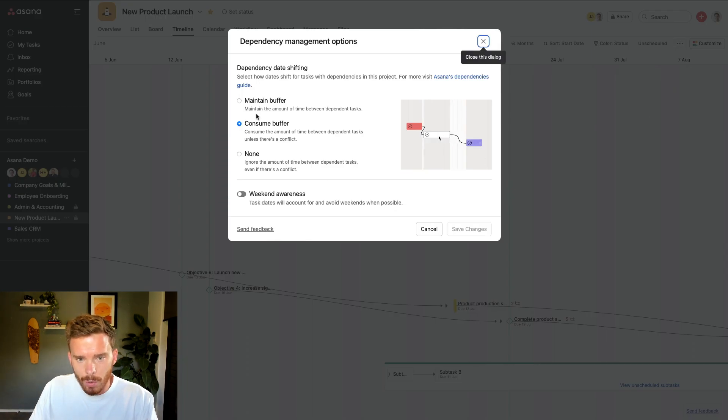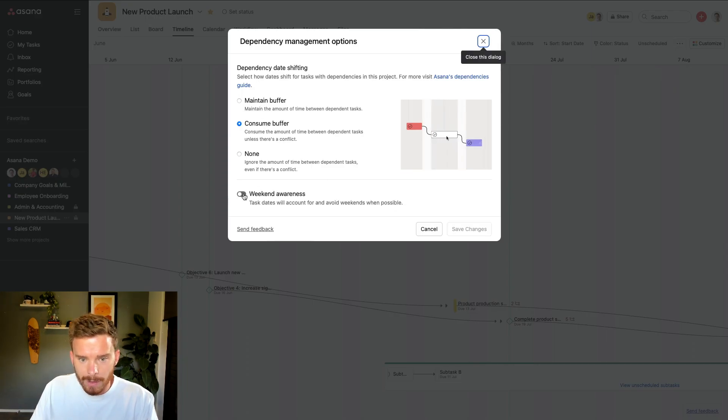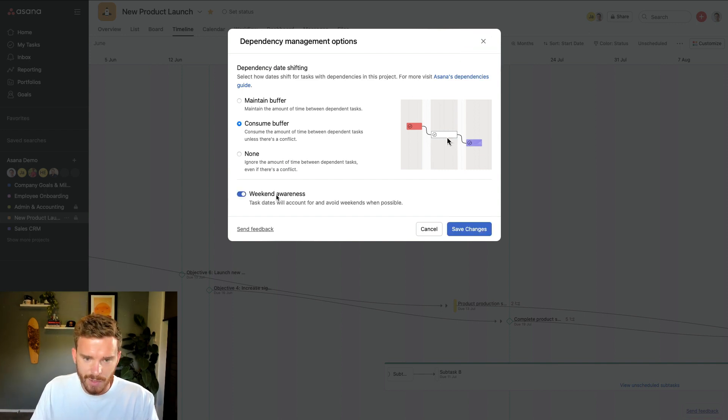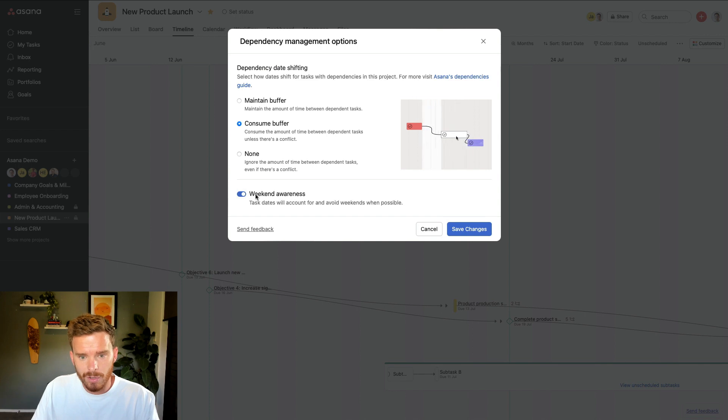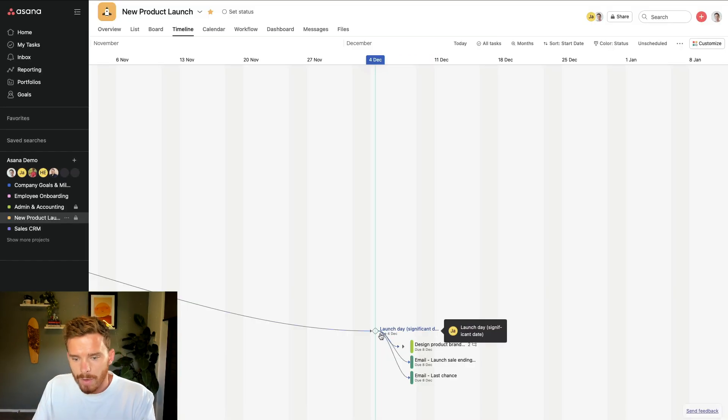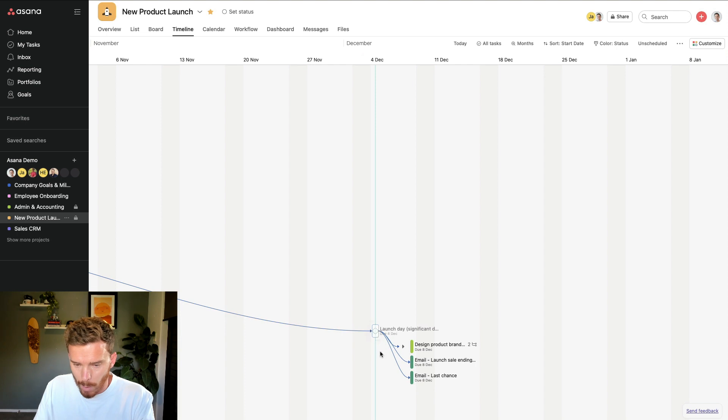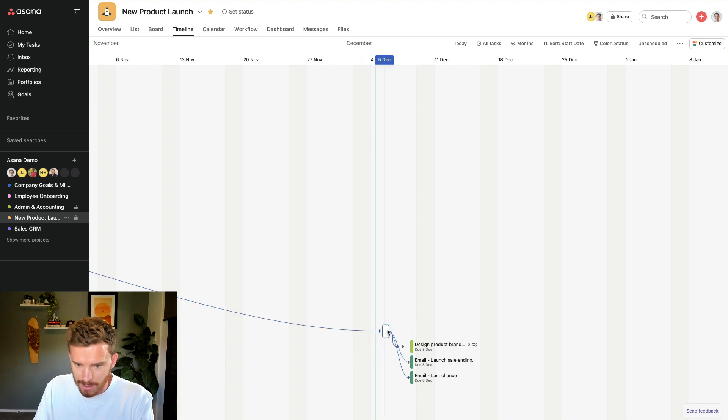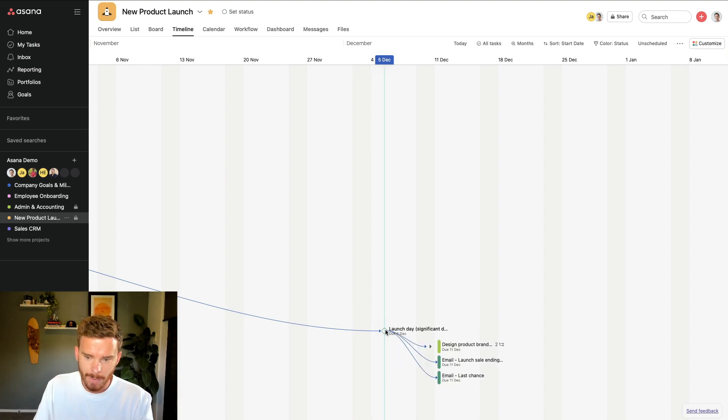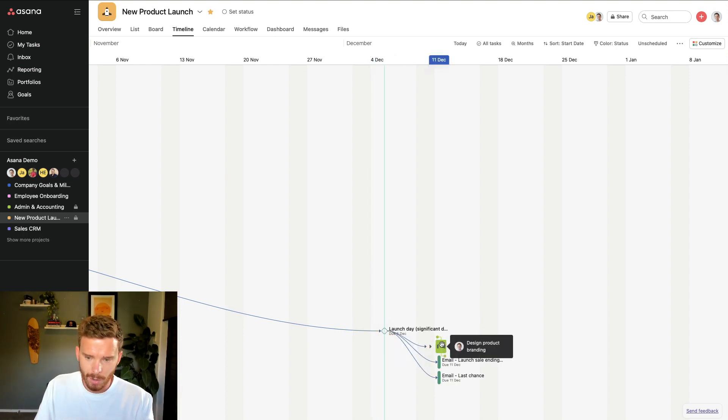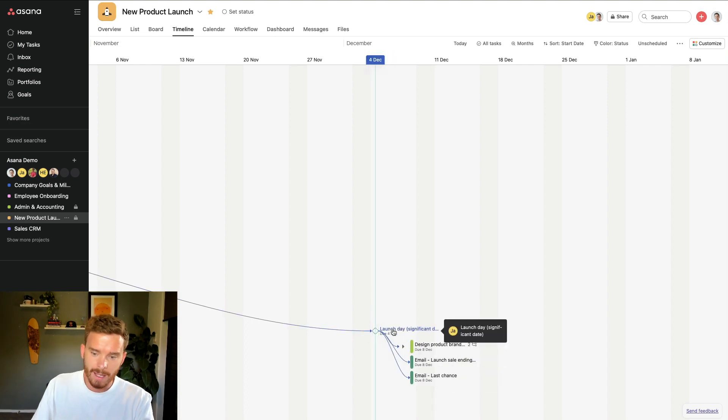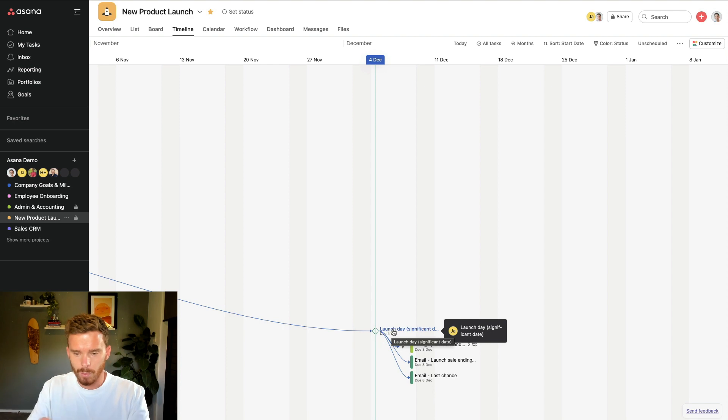So when I go to my dependency management options, make sure that if you're using the maintain or consume buffer, make sure that you enable the option to enable weekend awareness. So if I have a task like this, where I'm going to delay this milestone and I'm going to push it back a day, this will move the tasks to the weekend. But because I have avoid weekends turned on, they get reassigned to the Monday. If I move it back a day, they come forward to the Friday. So the weekends simply get ignored.